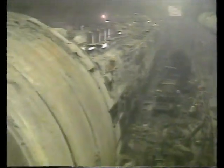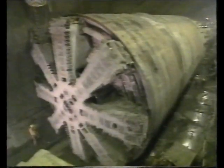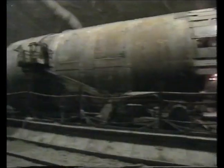Work on the crossover cavern on the English side was begun from the service tunnel before the rail tunnel TBMs had reached the site. It is located 17 kilometres from the English portal. A TBM later progressed through the cavern, providing unusual and spectacular views of the entire machine, with its long tail of complex machinery behind the cutting head. The Southern Rail Tunnel TBM took 9 days to pass through the cavern.